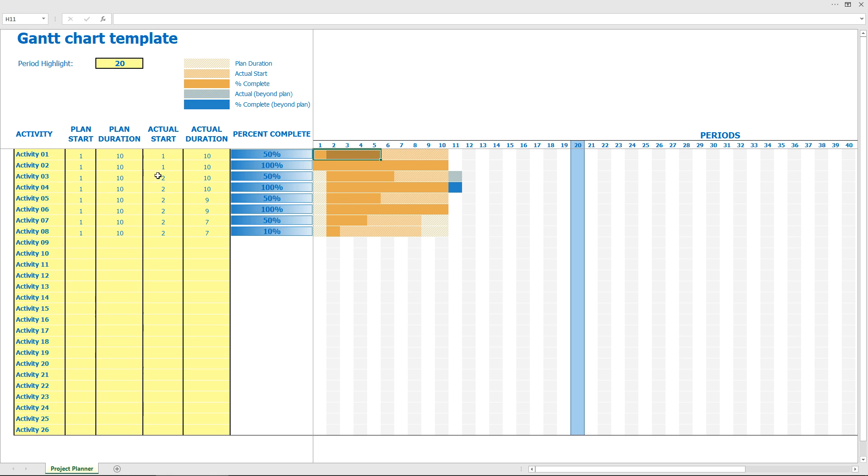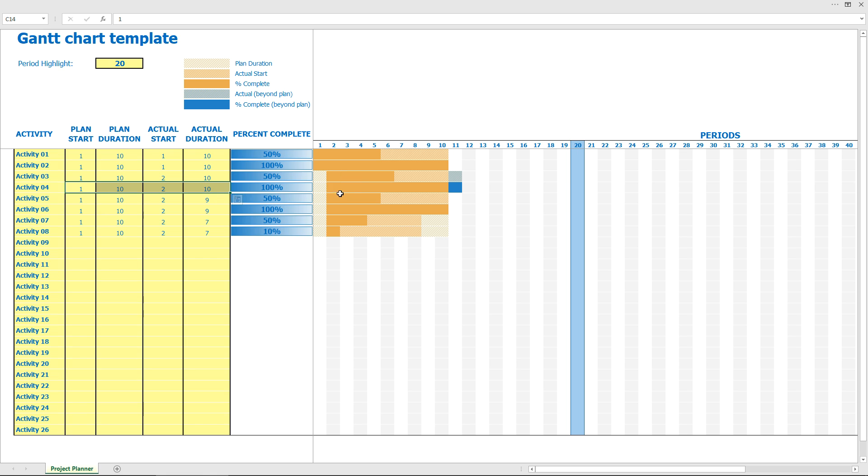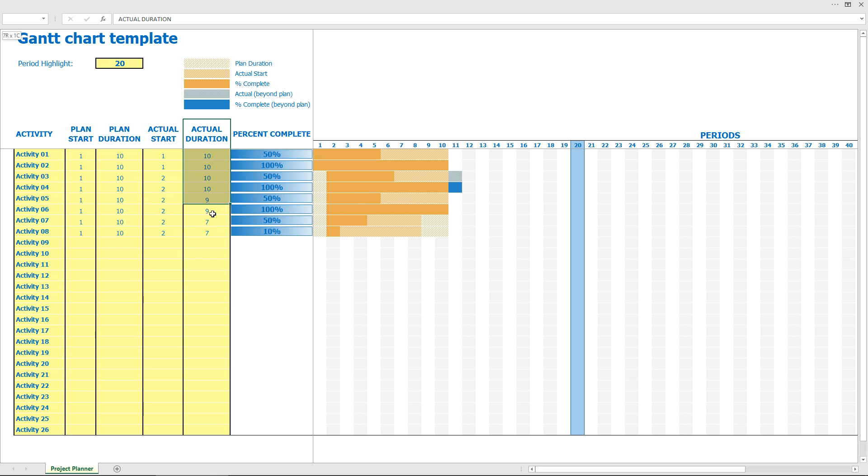And for example, if we reach percent complete 100%, it shows you like this. And for example, if we started it a bit later, we have shown this. And if we have 100%, it means we are beyond the plan. So blue shows you we are out of plan, and using the actual duration, you can adjust your real plan.